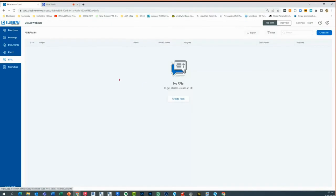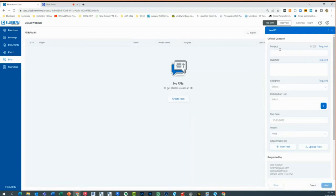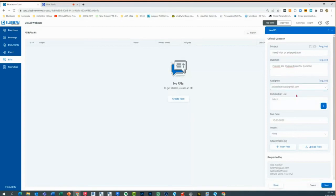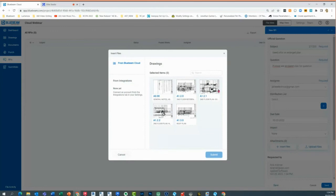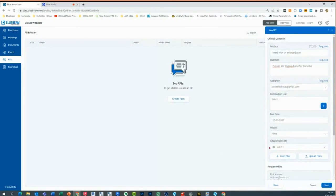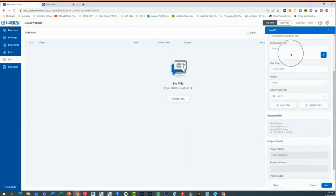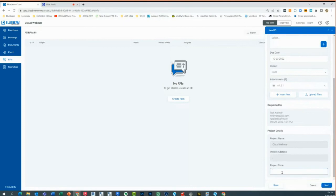Let's create an RFI the same way. I'll click 'create an item' and say 'need info on enlarged plan — please see enlarged plan for question.' I'll assign Jack, distribute to different people, and upload files by inserting from files I already have online. I can distribute to multiple people — really nice. I can put in a project code: 2022-10, address, et cetera, and hit send.